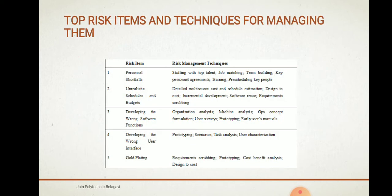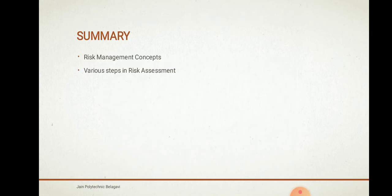Looking at the top risk items and techniques for managing them: the first is personnel shortfalls. Management techniques for this include staffing with top talent, job matching, team building, key personnel agreements, and rescheduling key people. Another risk is gold plating, for which the management techniques include requirement scrubbing, prototyping, cost-benefit analysis, and design to cost. In this video, we discussed risk management concepts and the steps in risk assessment. Thank you.